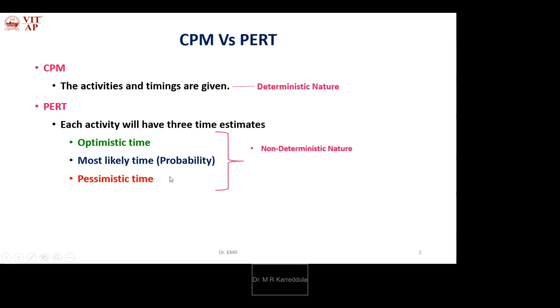So how are these useful? PERT is used to find the probability of meeting or missing target dates during project development. PERT provides a method for estimating the probability of meeting or missing target dates. Whenever an activity or project task has a target date, how many chances are there to finish it by that date?